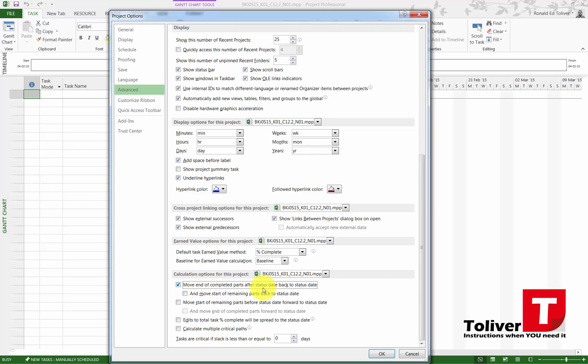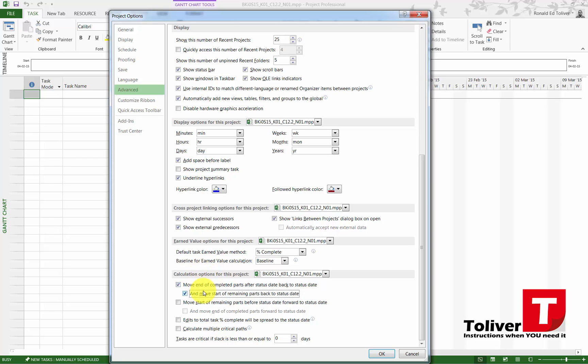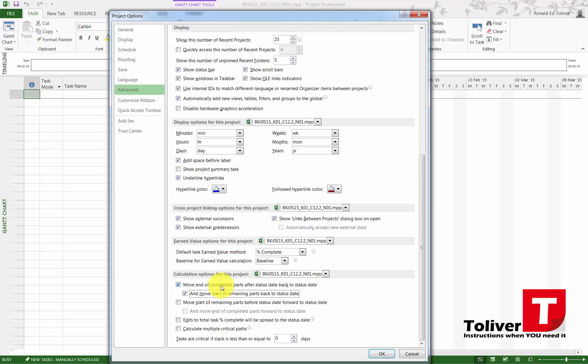I want you to turn this one off: Move End of Completed Parts After Status Date Back to Status Date. What this does is it allows you to start the assignment earlier, but instead of it just coming in a roll, it will actually just move the rest of the assignment until it's actually supposed to be finished, so it won't come in one process but you'll be able to divide the task.